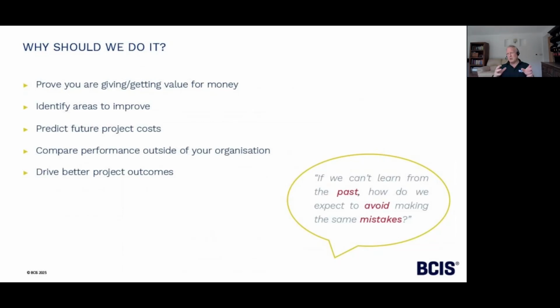Now, when we talk about benchmarking, there are different terms thrown around. There's internal benchmarking, which is comparing your project against others within your organization or your portfolio. External benchmarking, which is the next bullet point, is about comparing your project against others outside of your portfolio, sometimes even outside of your sector. Generally, we tend to work with organizations who are trying to do the internal benchmarking first, and then, once they've got their own house in order, if you like, move on to comparing against other organizations.